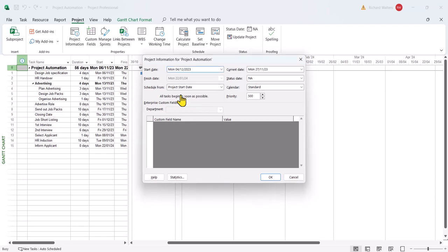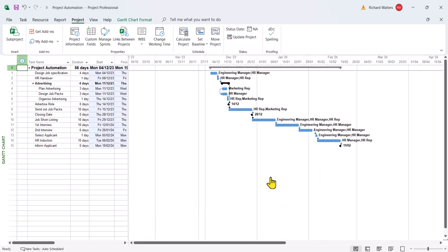And then when we click OK, you'll see all the dates will now align with this new start date. Now this is only available in auto-scheduling, so manual scheduling, this start date change wouldn't affect any manual scheduled tasks. And there we go.